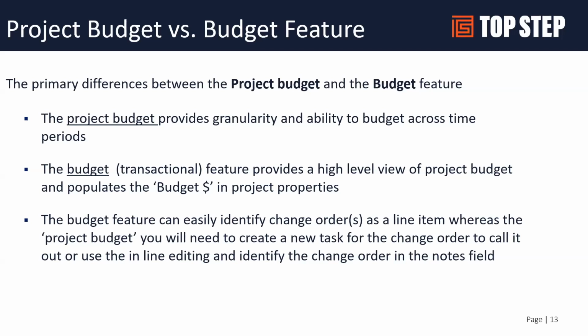So if I start off with a budget of, let's say, $50,000, and a customer comes back and gives me a $10,000 change order, now instead of overriding a budget to say 60, I can layer budgets on top of each other with dates and descriptions. On the project budget I can see 60, but under the covers I can see where this was made up from multiple budgets, and report against those multiple budgets as well, and use those in custom calculations as well.